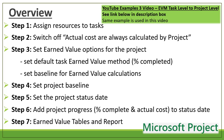In Microsoft Project we will follow the following steps. Step 1 is assigning resources to tasks. Step 2 is going to options and switching off 'actual costs are always calculated by project,' because we are going to add our actual cost manually. Step 3 is setting some earned value options — the default task earned value method to percentage complete, and setting the baseline for earned value calculations. Step 4 is setting our project baseline. Step 5 is setting our project status date. Step 6 is adding our project progress — the percentage complete and actual cost up to the status date. Step 7 is showing some earned value tables and an earned value report.